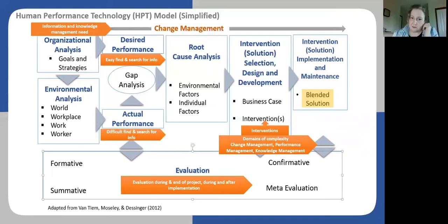The business case was done initially when we started the project, and in our case it was a project charter that had to be signed by the sponsors, by all the ones who would have accountability for the initiative.